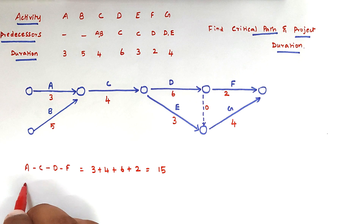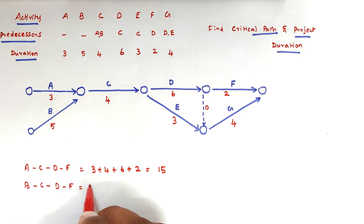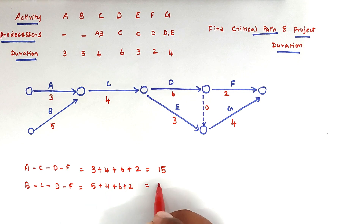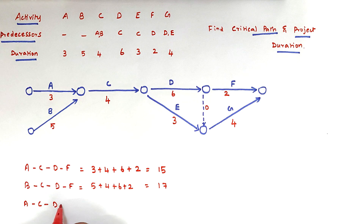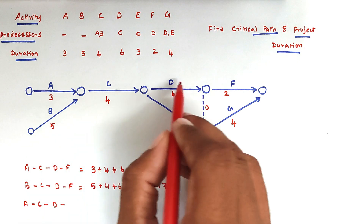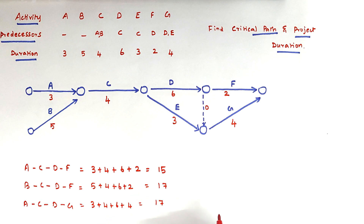The next path is B, C, D, F with a duration of 5 plus 4 plus 6 plus 2, which equals 17. Then path A, C, D, G has a duration of 3 plus 4 plus 6 plus 4, which is again 17.